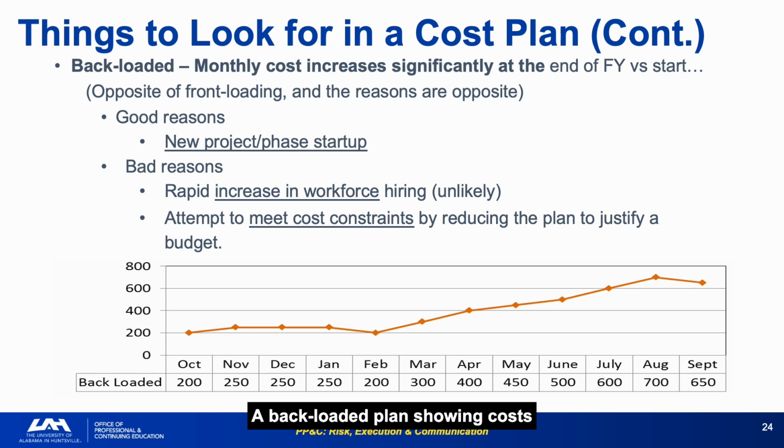A backloaded plan showing costs increasing significantly at year-end is the mirror image of front-loading, legitimate for a new project or phase startup, but suspicious if it reflects an attempt to fit within a cost target by reducing early spending. The bad reason for backloading is often not gamesmanship, but risk aversion. Analysts who are uncertain about whether resources will be available sometimes push costs to the end of the year as a hedge, which creates a different set of problems.